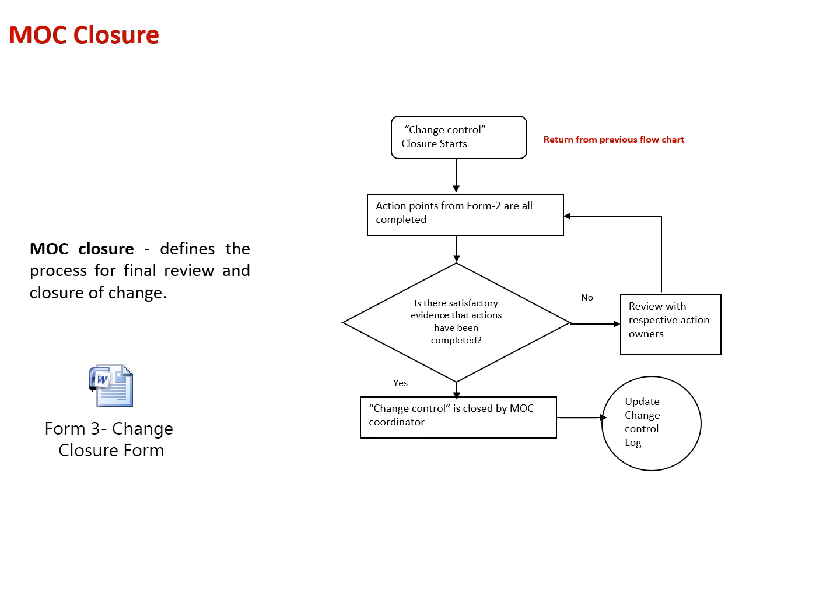Finally, MOC closure. In the closure change form, once accepted by the cross-functional team leaders or members, the change needs to be once again reviewed and the evidences need to be provided to the HODs so that there will be clarity on the work, and there will be closure of the MOC which can be documented for further use.